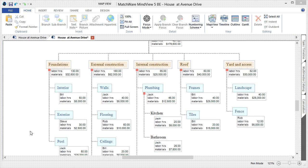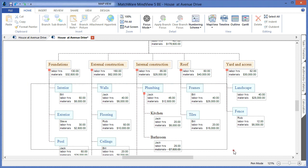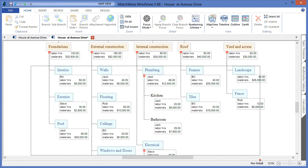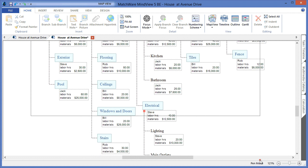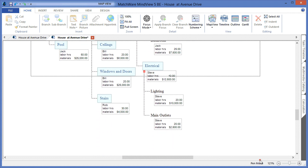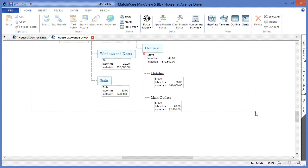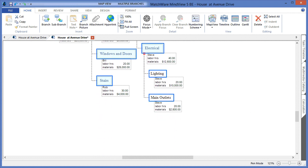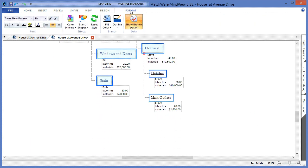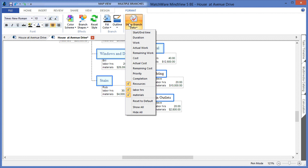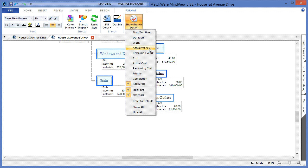Once I've finalized entering the information, again, if I'd like to choose to display further project information, I can select desired tasks within the WBS. I can navigate to the format tab, and I can associate additional task information, such as start time and end time, duration, work, actual work, remaining work, even completion levels.